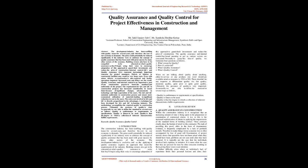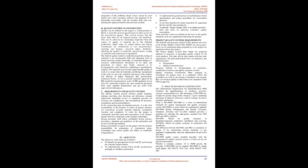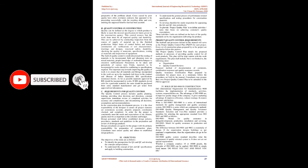A key to this is the increased sophistication of clients in applying the requirements of the standard forms of building contract. These contracts clearly place the burden of proof on the contractor. The task of providing this proof, often in the form of documentary evidence, is frequently complicated by a lack of pertinent records. Therefore, economic loss is often accompanied by loss of goodwill. Examination of project records shows that questions have not been asked when they should have been; problems are not seen until after they have occurred.